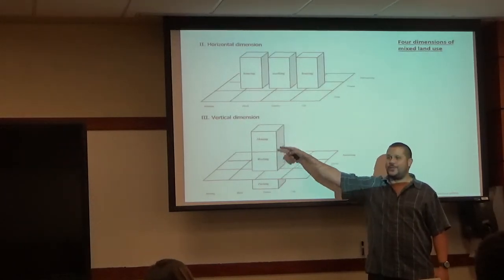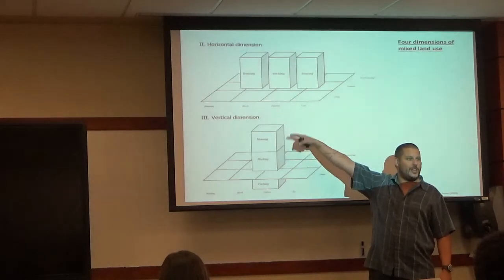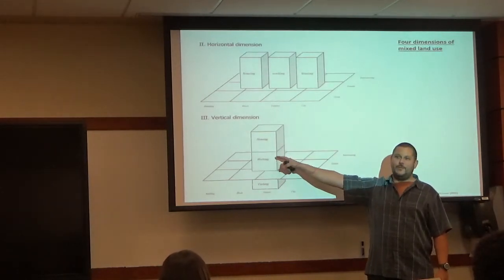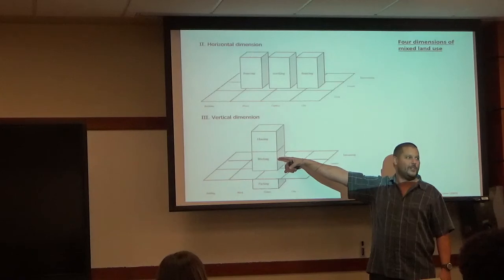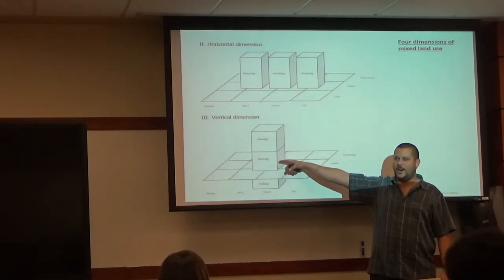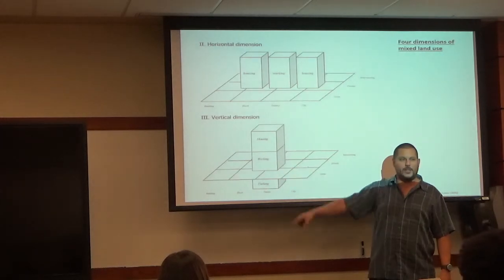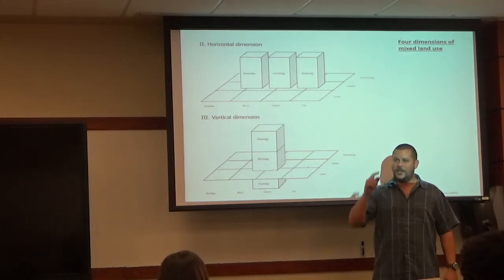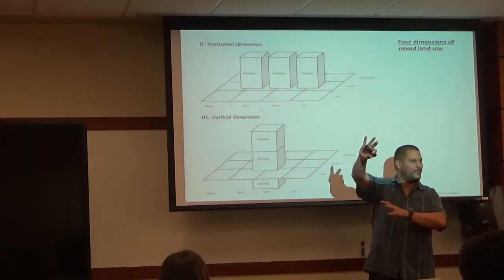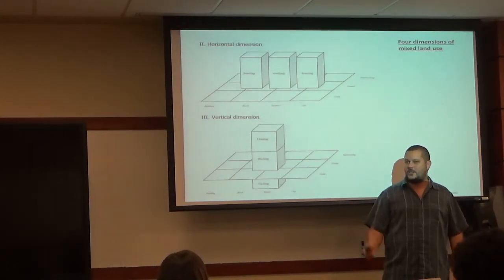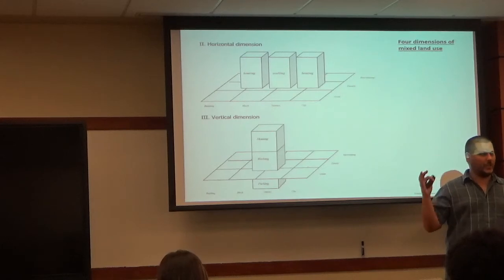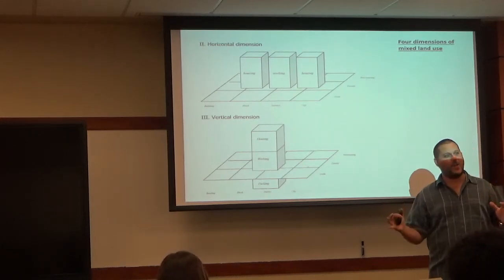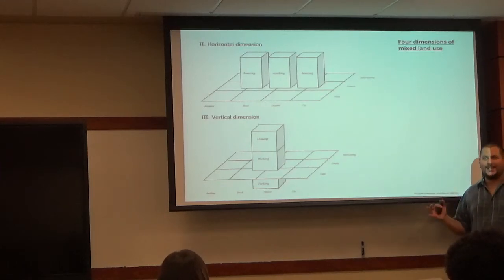If it is 8 floors and you run out of construction money, can you finish 2 or 3 floors on the bottom and have everything else on the top undone? Not really. That's what you see if you run down to Miami to the Brightline station. There's one building that looks like a parking garage structure, completely rusty, halfway. The ramp is like 2/3 up for the next floor. Why? Because they had financing issues, I think even back then with 2008. And now you have solid, reinforced concrete standing on the lot, and nobody wants to sell it, and how do you approach that?